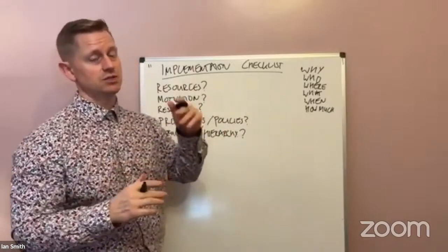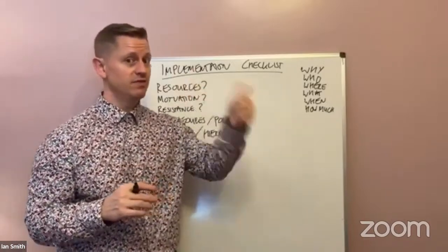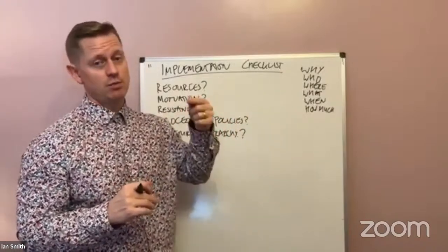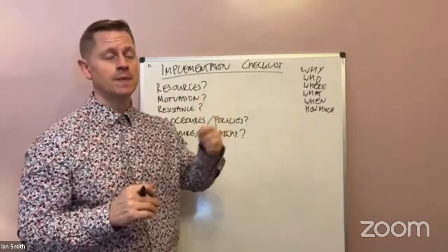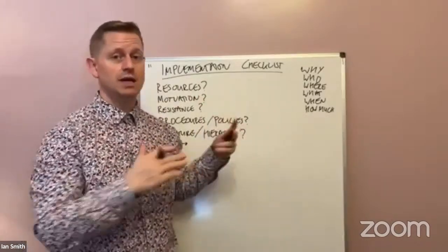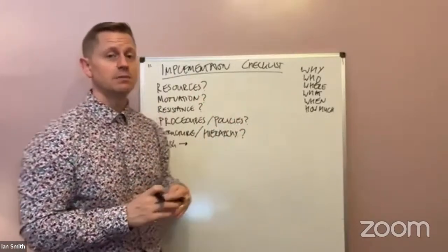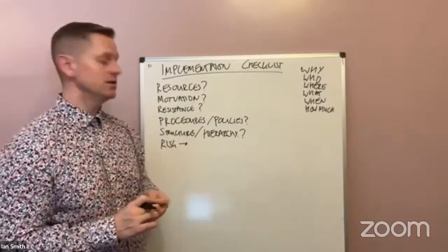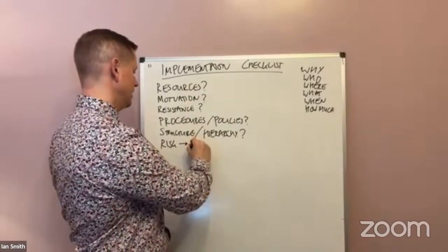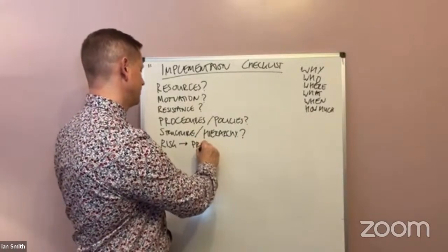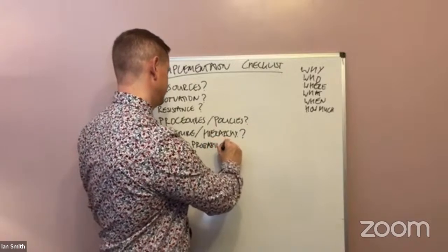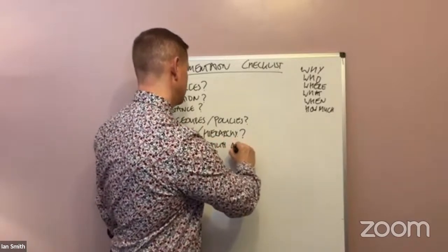So then you can assess and understand, has this happened before in terms of the risk? If it has, then obviously the probability of it happening again is higher. And what impact did it have, which will allow us to therefore rank the impact to the overall project and to the action specifically that we're taking. So looking at probability and impact.